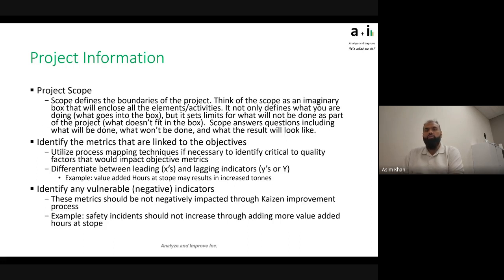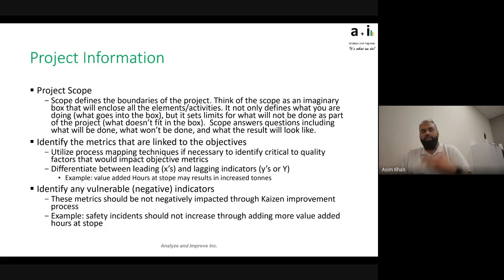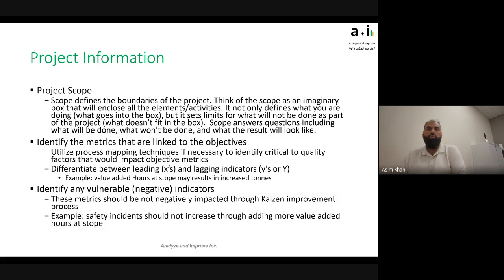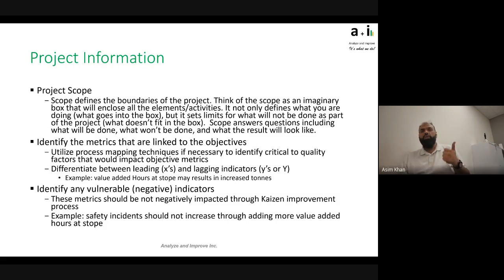Leading indicators are something the project would directly impact and you'll see the results quickly, versus lagging indicators where there's an indirect impact that takes time to show. Also identify vulnerable or negative indicators — KPIs that could be negatively impacted by your project. If this is a case, identify it in the project definition so you can keep an eye on it and ensure your project isn't working on something negative for other parts of the company. This also becomes useful during prioritization when evaluating whether this is the best project for the same KPI.